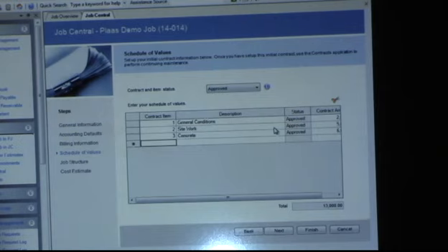Okay. Yep. Yeah, and if you're going to a commercial project and you have general conditions type work. Yeah. And in general, setting up the contract is however your customer wants to see the invoices you send to your customer. So when you set up the estimate, it's whatever codes you want to track against for your costs. You can have as many or as few as you want. When you set up your contract, it's as many line items as your customer wants. So if it's a T&M single line item, you set it up as a single line item.